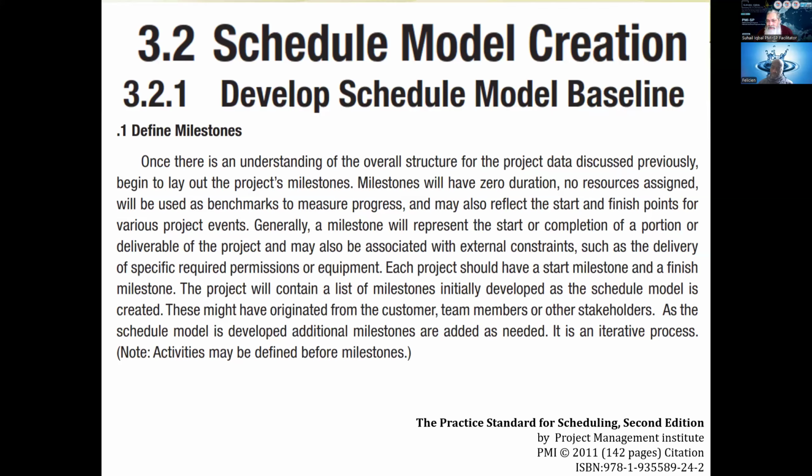So, milestone is not arbitrarily drawn, they are from the point of view of the whole project. Is it a big milestone for the project? Yes, but generally, I have indicated where more than one arrows are converging in or shooting out of an activity, that could be a candidate for a benchmark. Remember this thing, this is a very important thing which I have just told you.